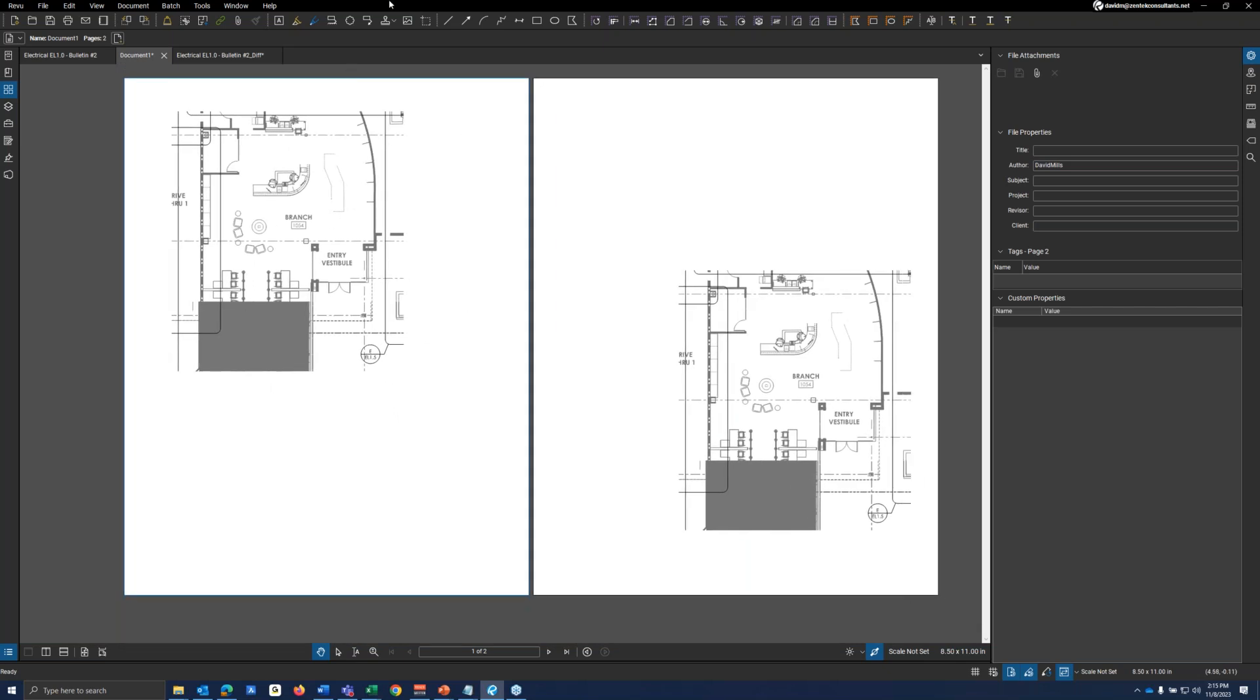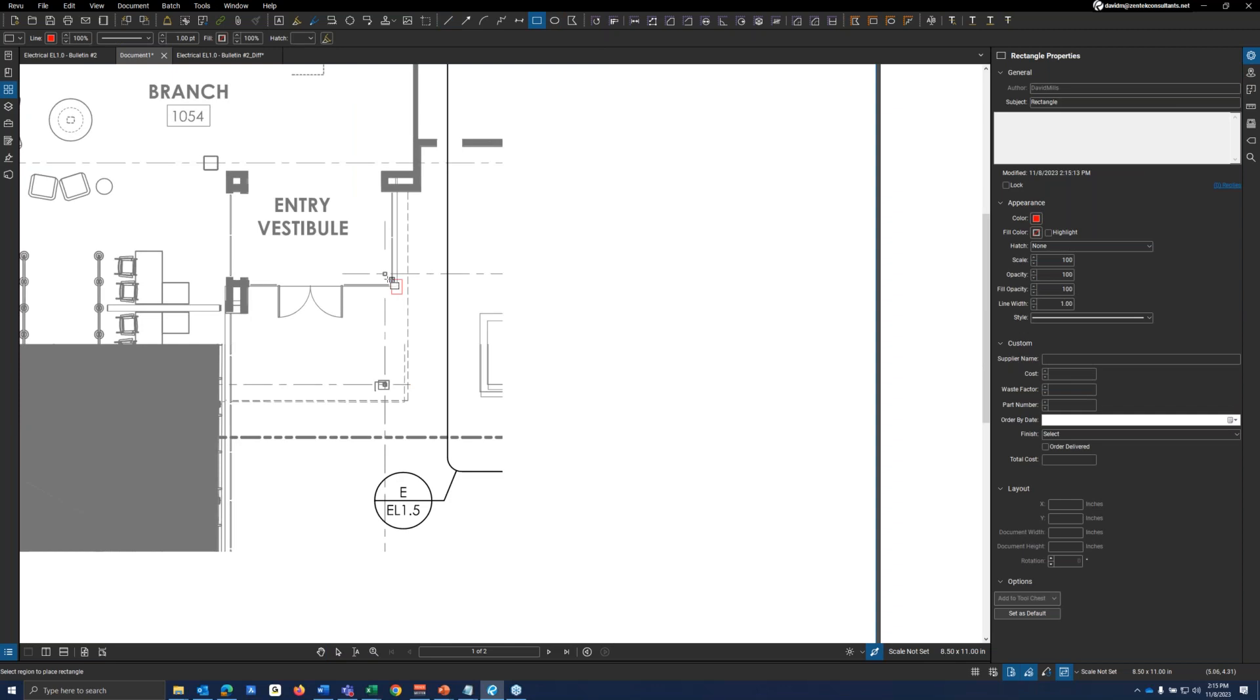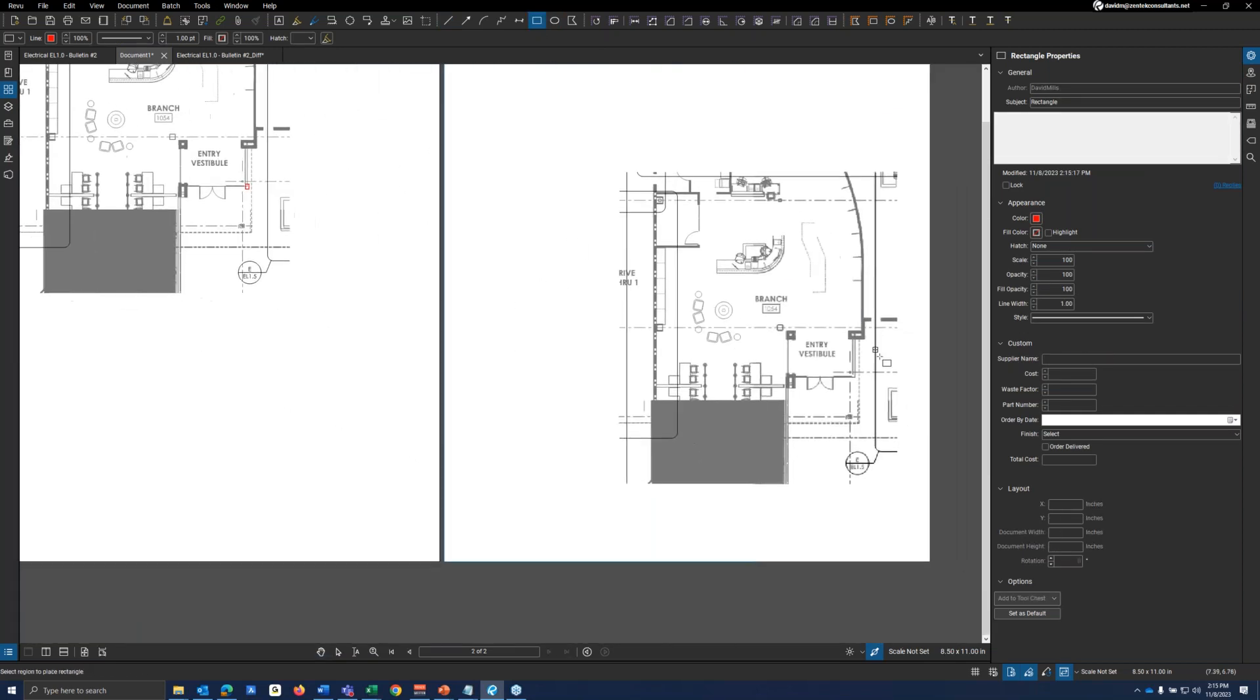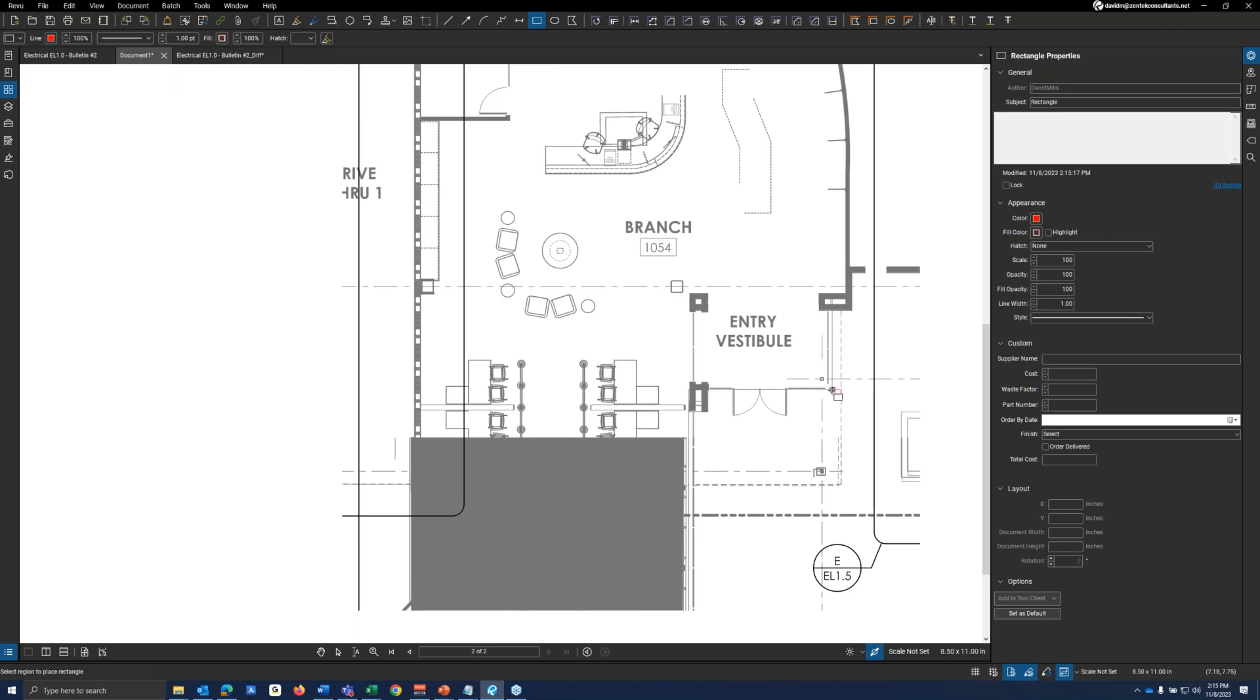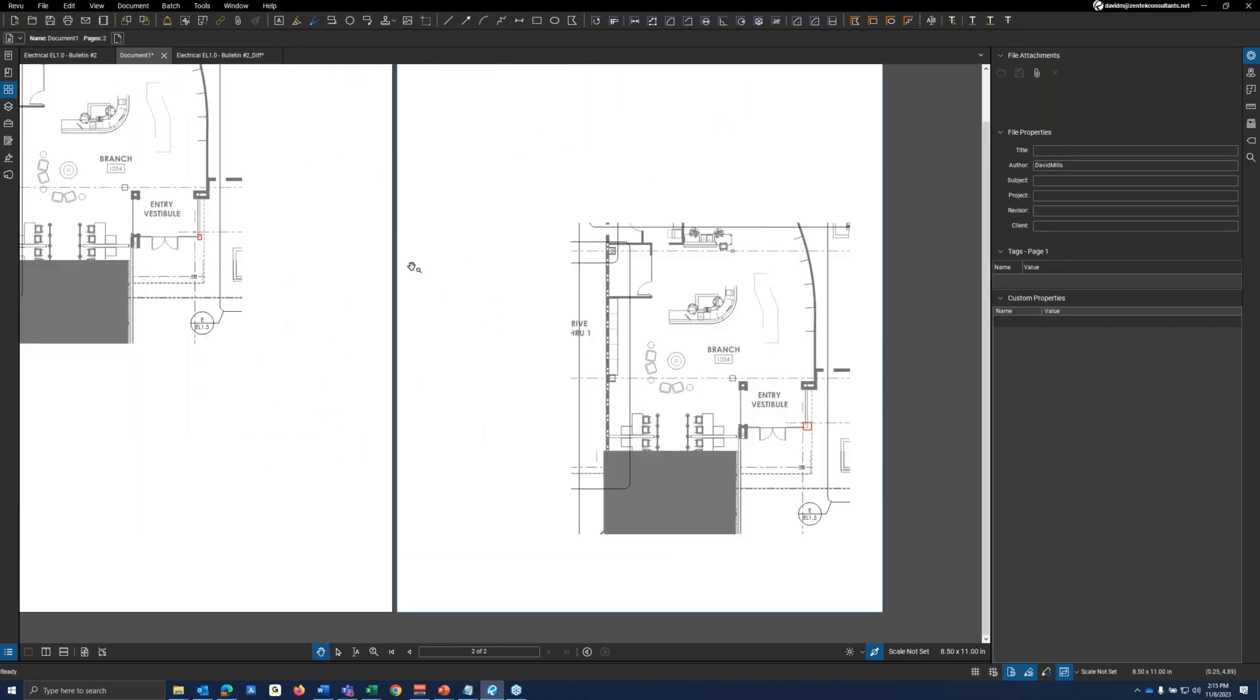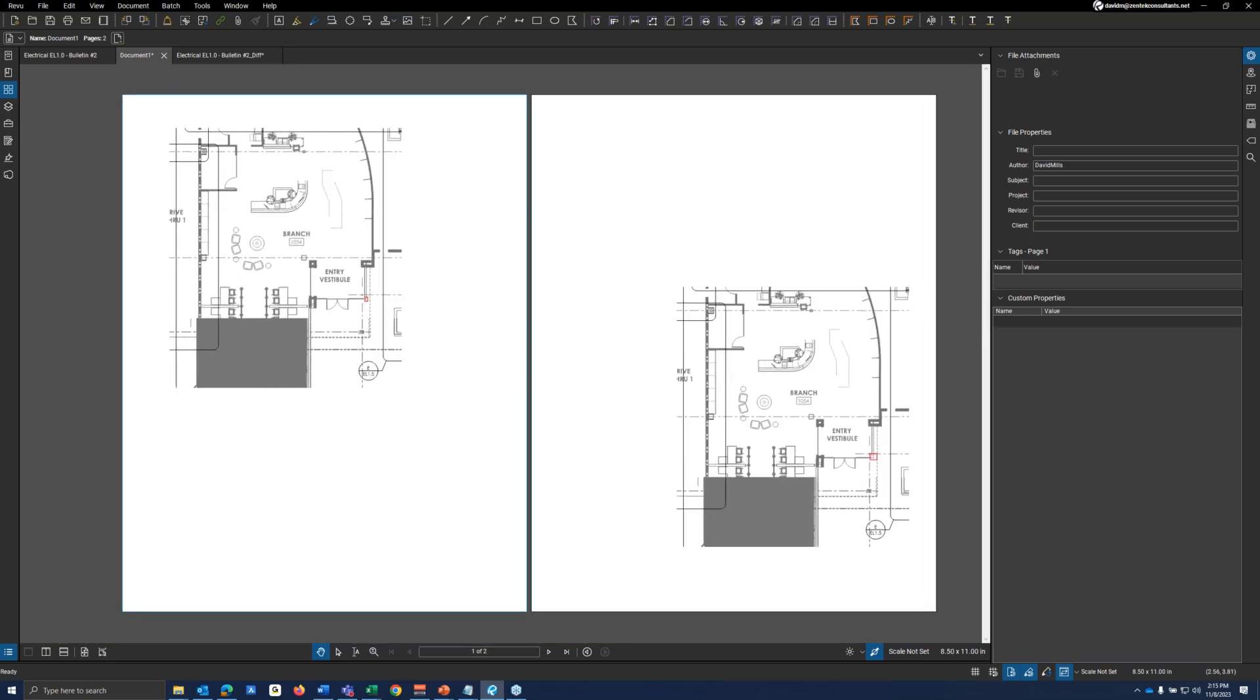And this particular example, you know, if I did a little square right here, I marked it right here. I would also want to mark that same pick points on this drawing as well over here. So a little bit confusing. It takes a little bit of practice to get used to with the pick points function. However, that's where you want to have a good relationship with your architect or engineer or whoever else is doing any type of line work drawings for you. Definitely work with them just so they do not change any of the models around on the plan when they do go to transfer it from AutoCAD or Revit into a PDF, because it's just going to make your life harder at the end of the day, for needlessly no reason at all.